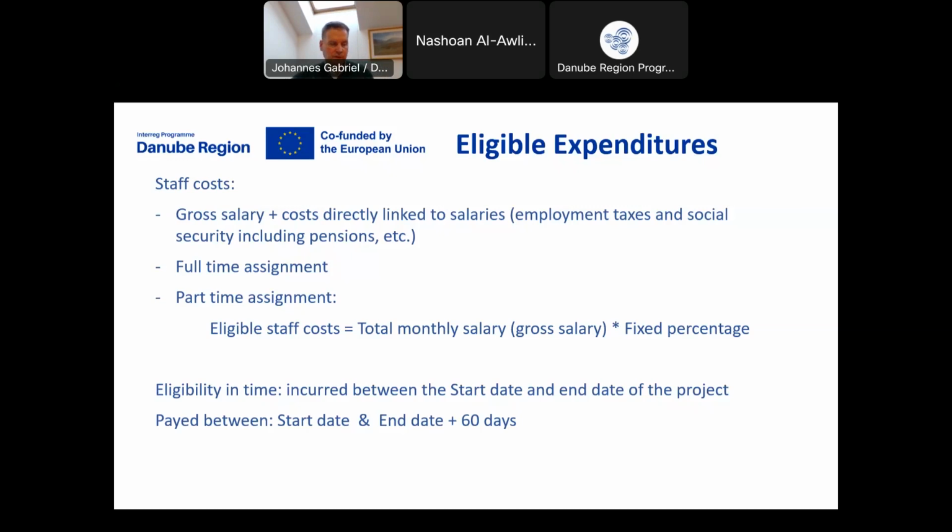Here I come back to the 12 months project duration, since the end date of the project is mentioned. So we say 12 months, but since we deal with those 3 compulsory outputs, eventually plus some further additional activities, and applicants flag us that after 10 months they provided those outputs, then we are fine with that. And then also the reporting can already start, and the process will be shortened accordingly, including the reimbursement.